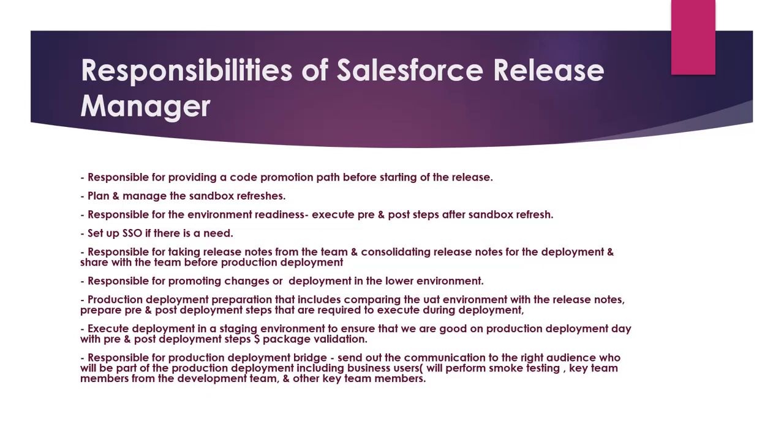And production deployment preparation includes comparing the UAT environment with the release notes. Basically, that will ensure that there are no extra changes the team has put in the UAT environment compared to the release notes they are handing over for the deployment to the production environment.